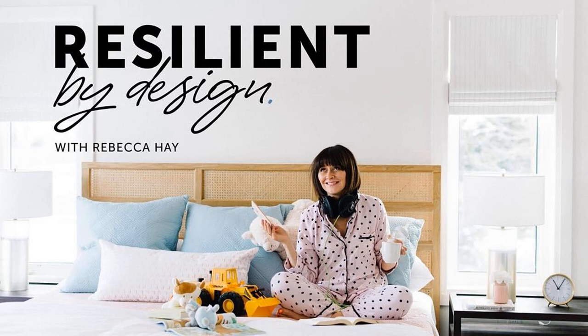No, thank you. Flat fee has saved us literally tens of hours, if not more, in implementation because we collect all the money up front. We still track our time internally so we can see at the end of the project how profitable we were. But it means we're not going back to them, negotiating, and they're not getting tired of writing checks. At the beginning, everyone's like, yeah, great, I'll write you a check. Oh, this is exciting, right? By the end, they're tired because renovations are stressful. They feel like they're just bleeding money.